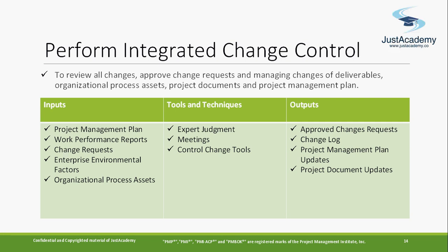And sometimes they give you scenarios, trying to show real project situations, where a customer comes with a new requirement and you go and accept it and make the changes. That is not how it should work as per the standard way. All those things are different, but it has to go to the change control board to review all the changes, approve change requests, and manage changes to deliverables, organizational process assets, project documents, and the project management plan. For the input, you will have the project management plan that you get from the previous process,